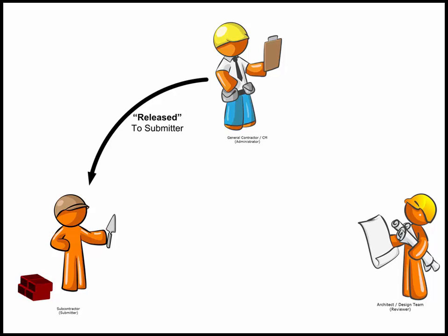When a contractor receives a notification to submit documents, they must locate the required documents and upload them into the system. Usually, the documents required for a submission can be located on a product supplier's website or created internally within the contractor. Websites such as Dodge Suites provide a service that helps subcontractors locate a wide variety of the required documents.